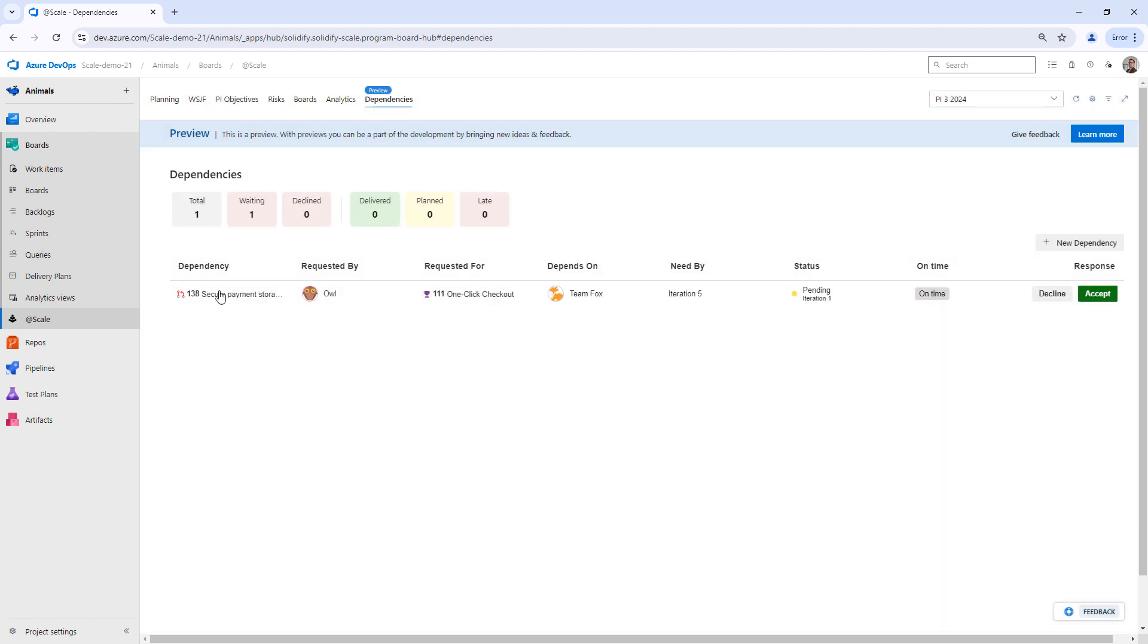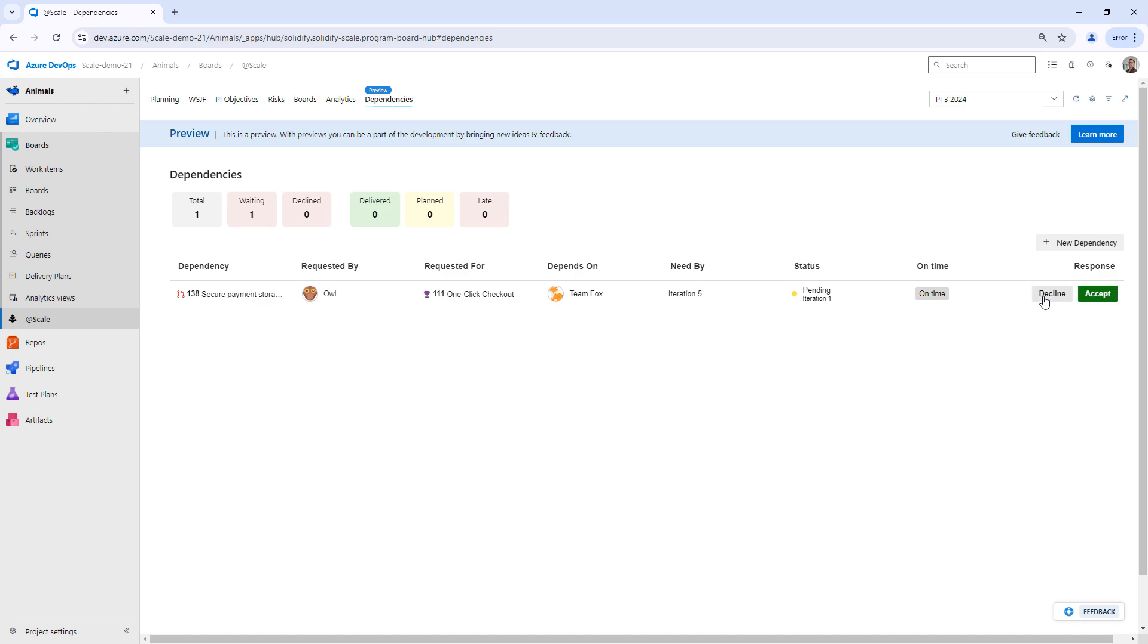This creates a dependency request. We can see that it's requested by Team OWL. It's requested for one-click checkout and it depends on Team Fox. So Team Fox needs to do an action here: accept or decline.